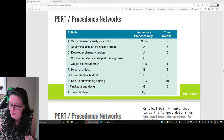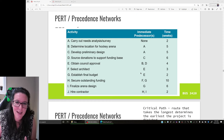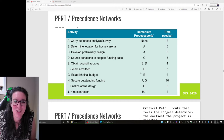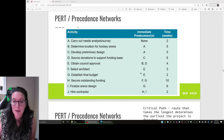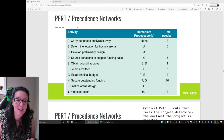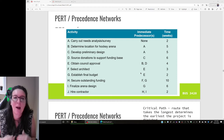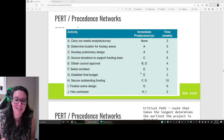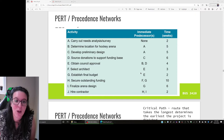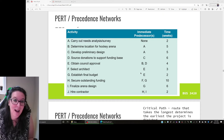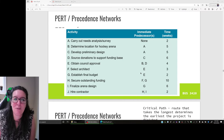Our focus for this class is that when we look at a precedence network or PERT chart, we have a list of activities, the time they take, and we identify what the predecessor is — what came before. Using the hockey arena example: the first thing is to carry out a needs analysis or survey. Then comes B — determine location for the hockey arena — whose predecessor is A. Before you can do B, you have to first do A. Notice that C — develop the preliminary design — does not depend on B. We don't have to determine the location before starting the design, but we can't develop a design until after the needs analysis.